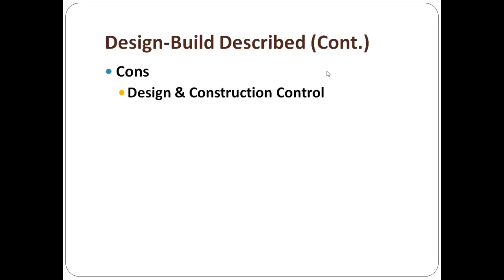And you're having the builder control the design, what materials, what quality, and the scope and so forth, the quality of your design, and even the design not being fully completed because he's both the builder and the designer. So you're giving up control of not only your money during construction and the construction, because you're not doing it yourself, but you're giving it up during design, when normally the architect, if he's working just for you, is designing that building for your best interest to get the best price and the most completely designed, detailed building, and then overseeing the construction of it, giving some measure of visits there to make certain it's built according to the design, the plans as they are designed.